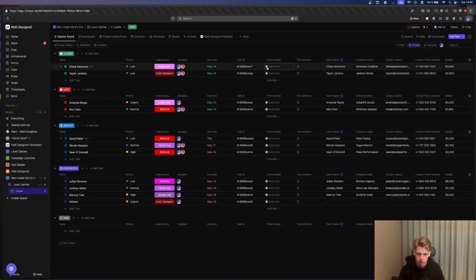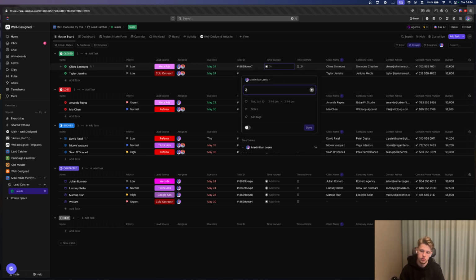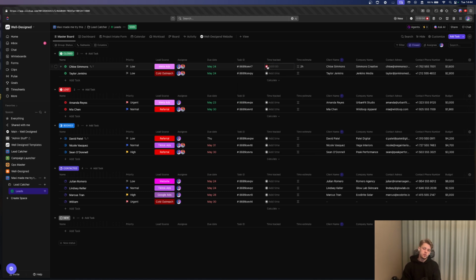But yeah, time tracking. You press on play, it starts tracking. Extremely simple. Time estimates, you write how much it's estimated, 2 hours. I can also add time. I can add a note, 2 hours, worked on, add copy, yesterday for 1 hour, 1 minute. Or just press on play. You will get some nice reports using the time tracking feature, so I do recommend thinking about this.